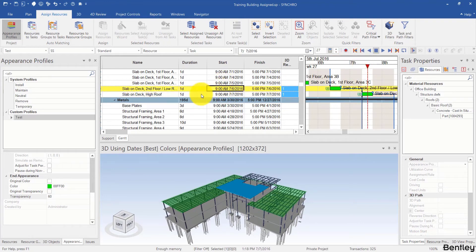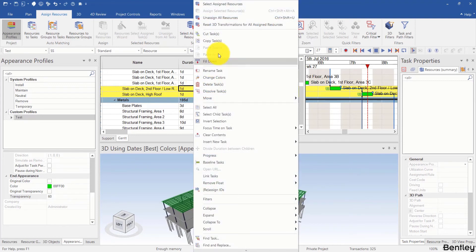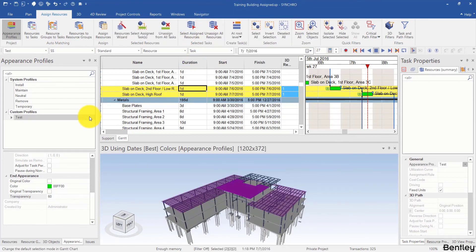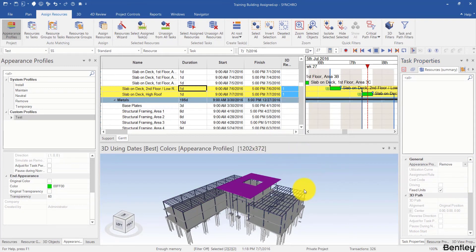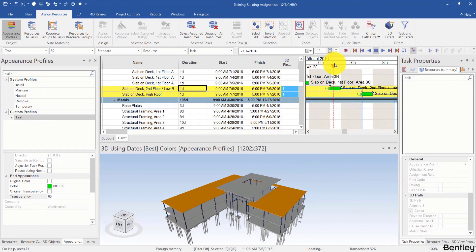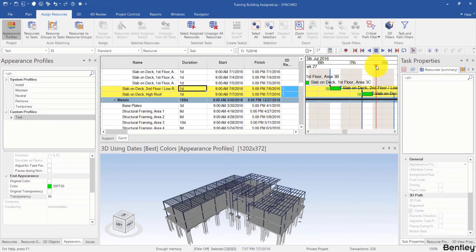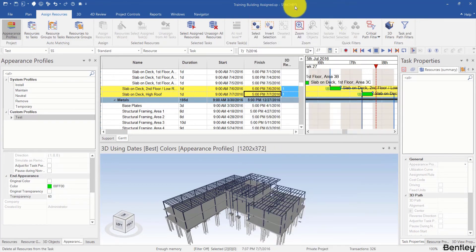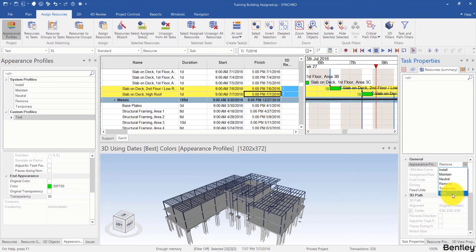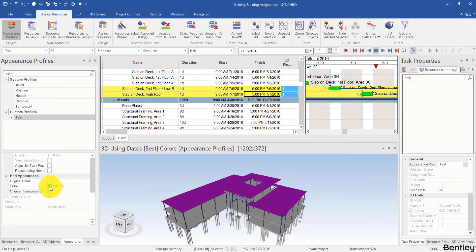I can do this for multiple tasks. I select these two tasks and right-click, select Assign Resources, and change the appearance profile from 'test' to Remove. Now if I drag my focus time, I can see both resources are using the Remove profile. I will then select those tasks again, right-click, select Assign Resources, and change them back to 'test'.